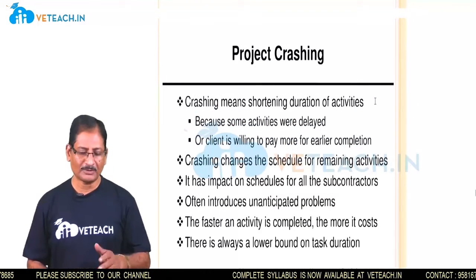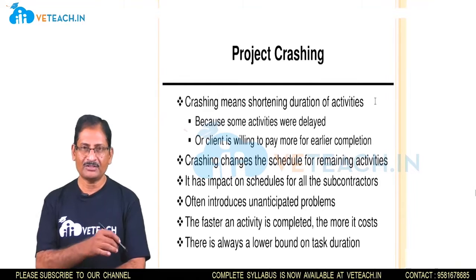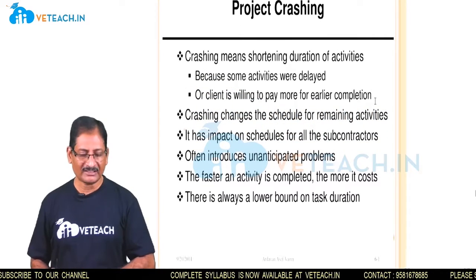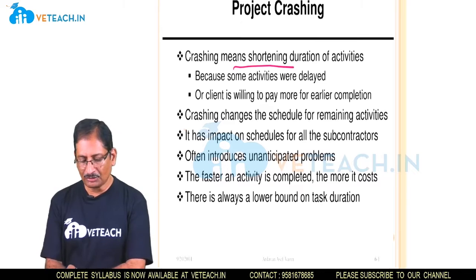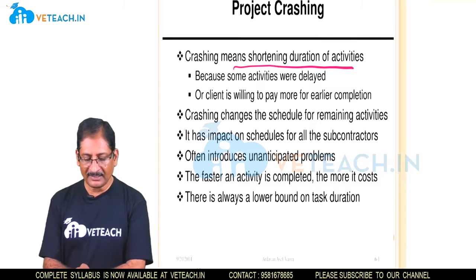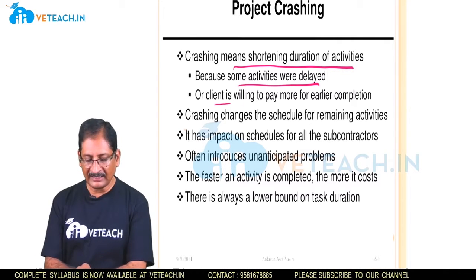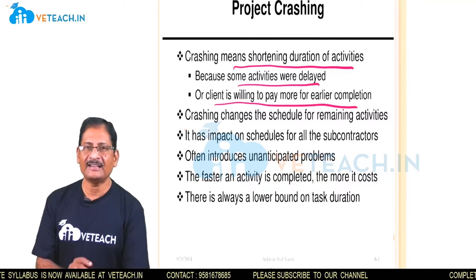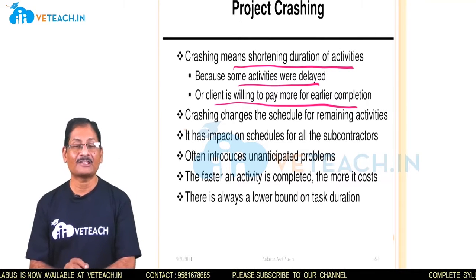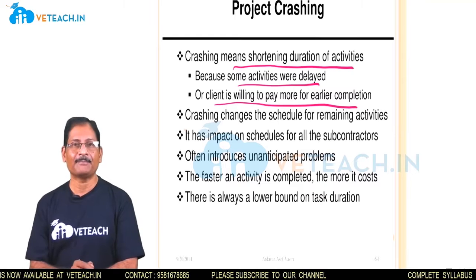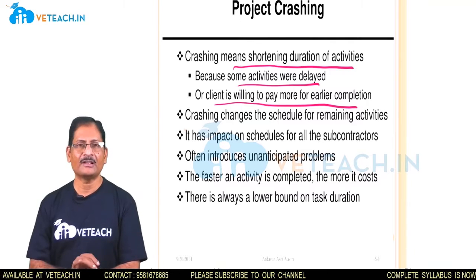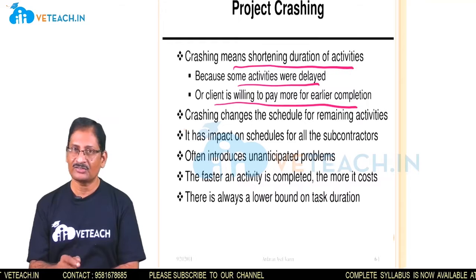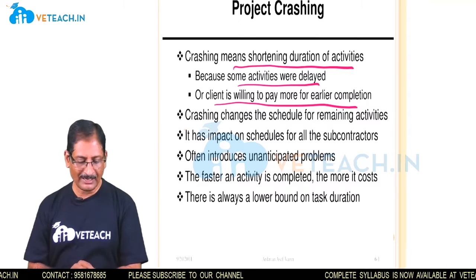And before we close this particular topic, I am once again recollecting the topics which we discussed earlier. One is project crashing. Crashing means shortening the duration of activities because some activities were delayed or the client is willing to pay more for earlier completion. So if the client is ready to pay more for completion of this particular task before the time, or if some of the activities are delayed, in such situations you can go for crashing.